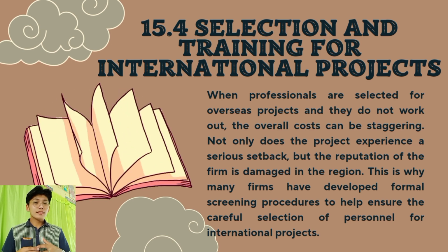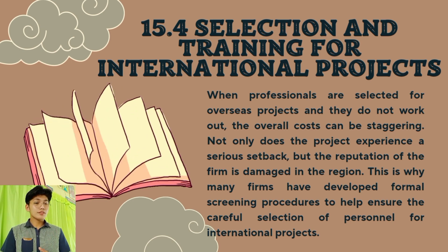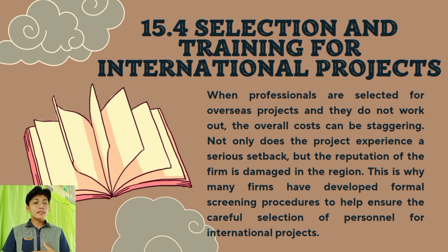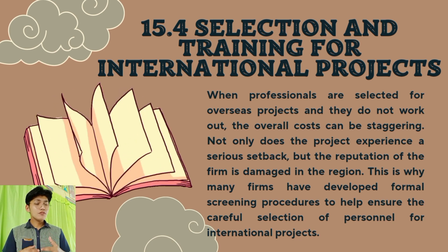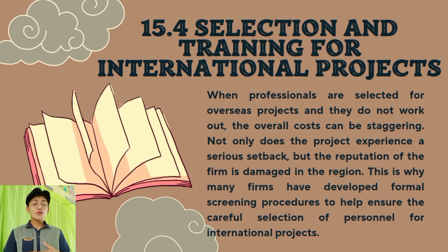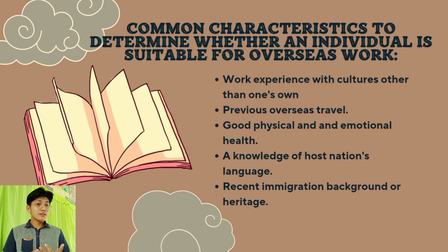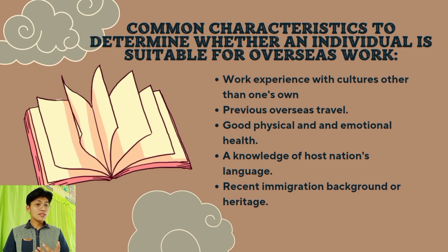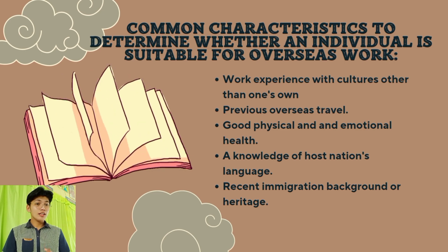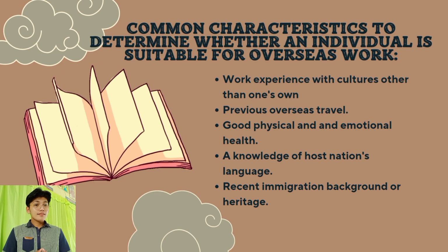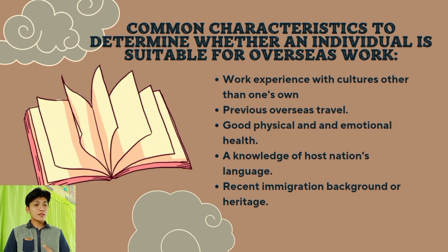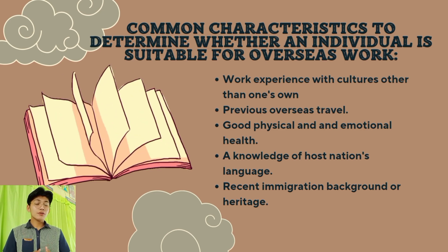Choosing a person takes a lot of criteria to be considered. Organizations examine a number of characteristics to determine whether an individual is suitable for overseas work. They may look for work experience with cultures other than one's own, previous overseas travel, good physical and emotional health, a knowledge of a host nation's language, and even recent immigration background or heritage.